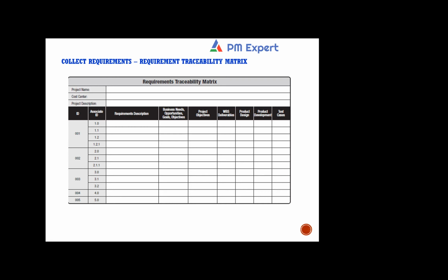So in the backward traceability, they have included both high level and detail level requirements, right? The high level requirement may be in the charter, whereas detailed requirements are there in the requirement documentation. And in the forward traceability, they are not only mapping each requirement with a deliverable and the test cases, they have mapped it with the design and development components also.